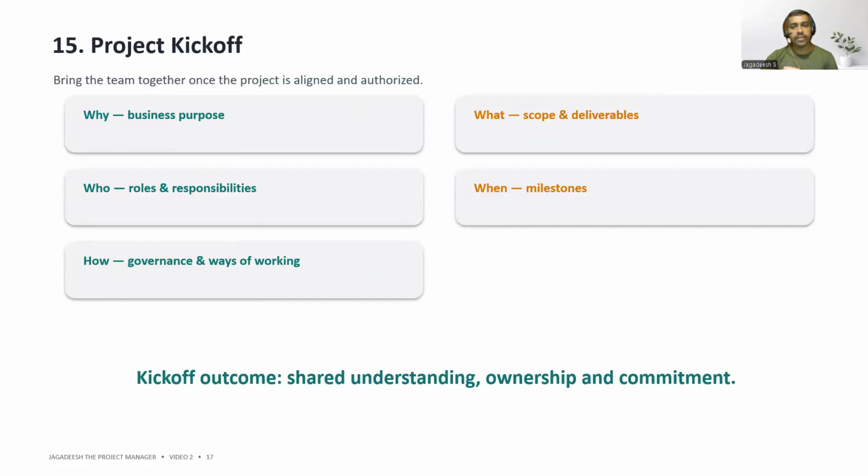After initiation, it's definitely the project kickoff. For me, a kickoff is not just a meeting where everyone is introduced. It is the point where the team gets aligned on why the project matters. What are we delivering? Who owns what? The major milestones. How we will work together. A good kickoff reduces ambiguity before detailed execution begins.